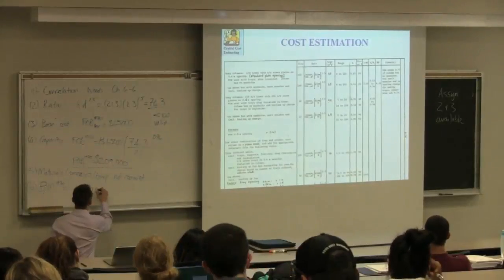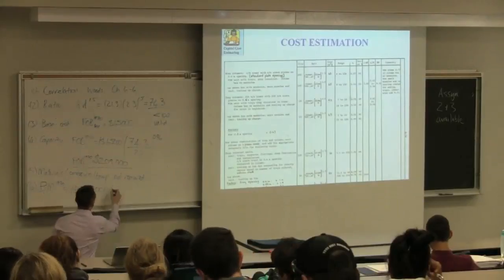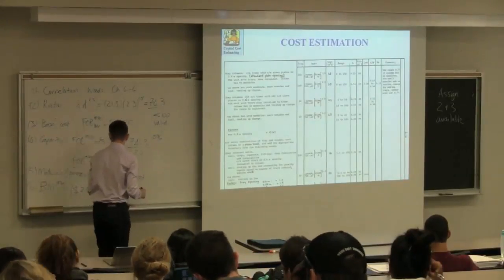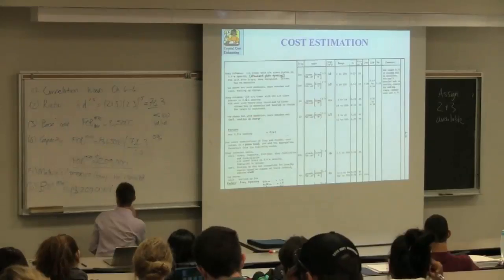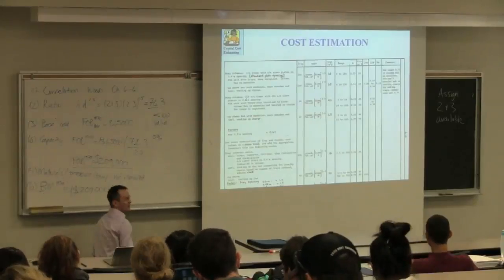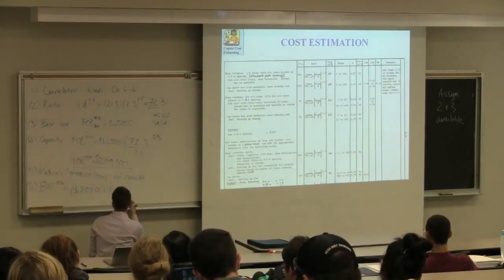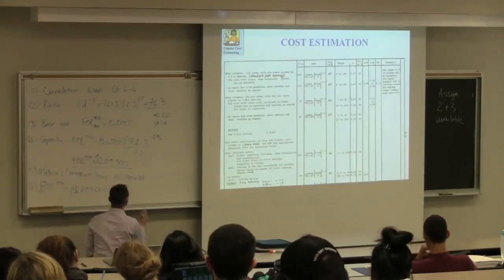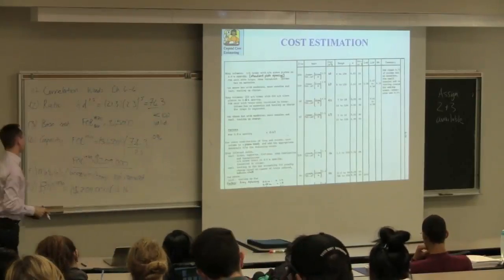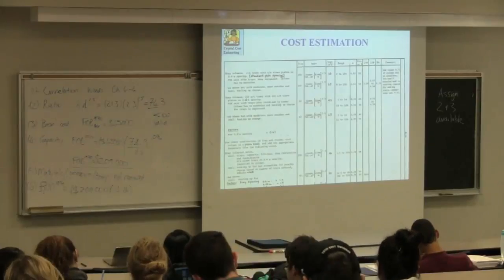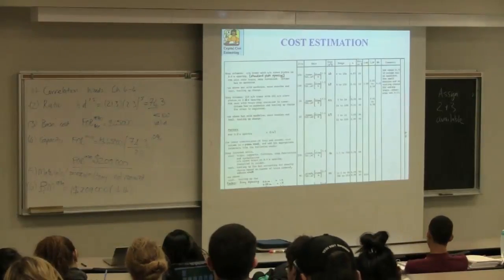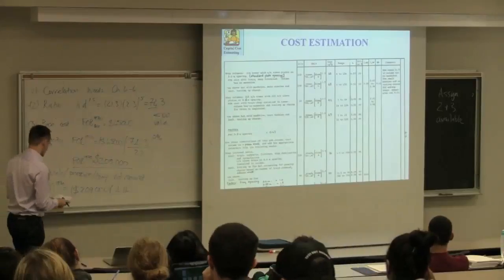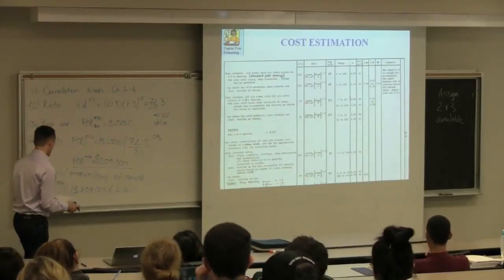And it makes sense. For a distillation column, there's going to be, inside that bare module region, an incredible amount of extra piping and work and labor to get that installed. So the tower itself, all the structural supports around the distillation column. So then this number of 4.16 is not surprising at all. It's going to cost us more than 4 times the base price to get the unit installed with piping and requirements in the bare module. So that gets us a number at 869,800.